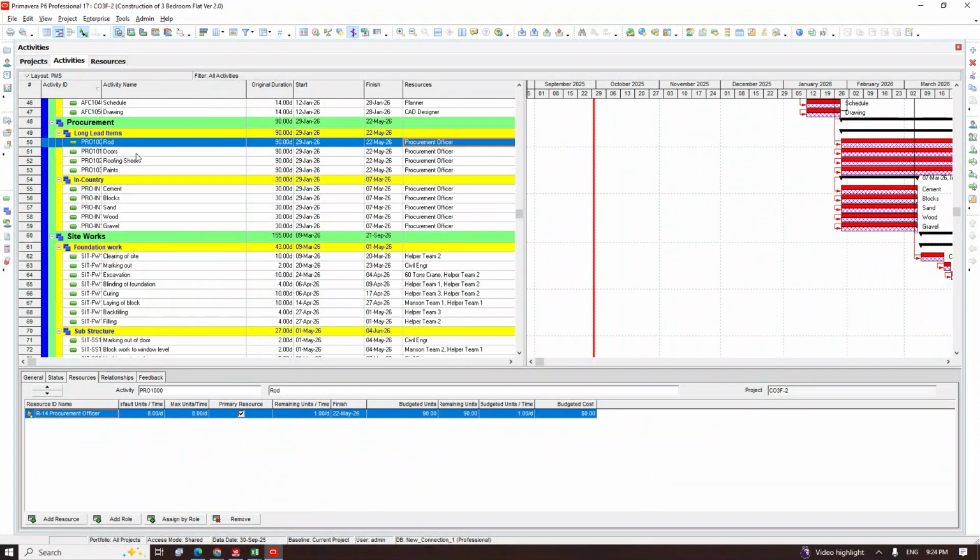So at the end of the day, he has other things he's going to do, right? He's not going to work on this task alone. It might also be that there are other projects where he's following up their procurement. It might be that he's trying to get inquiries from different vendors, or putting together a proposal. So he has other things, but we are asking, for this activity, will he spend 8 hours each? And we said no, each day the highest he's going to spend on each of them is 2 hours or 1 hour. That's why we are reducing the hours he's going to put in to 2 hours.